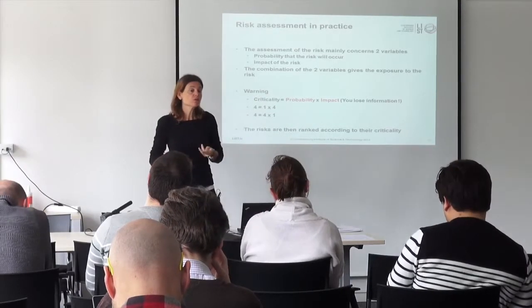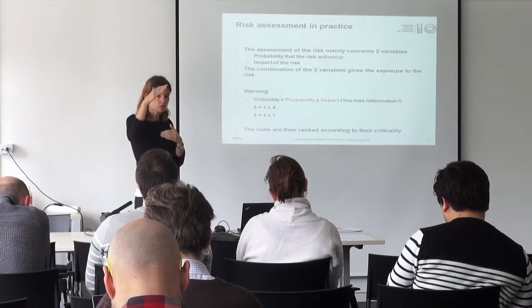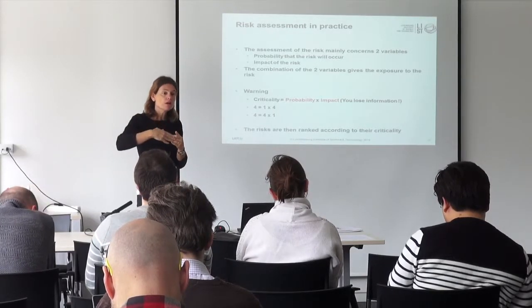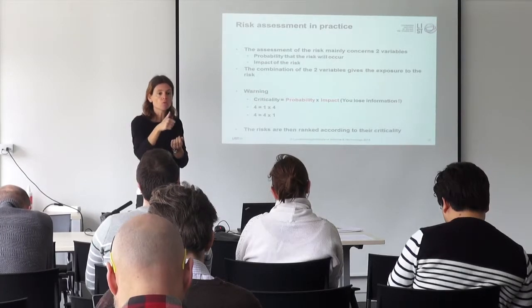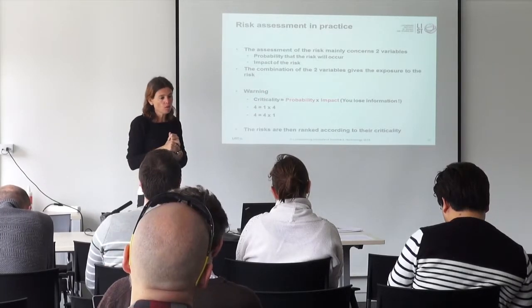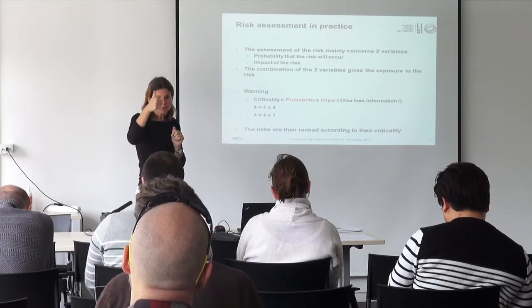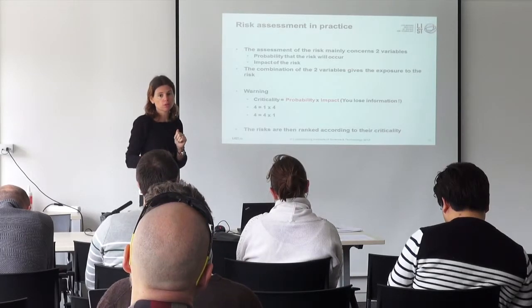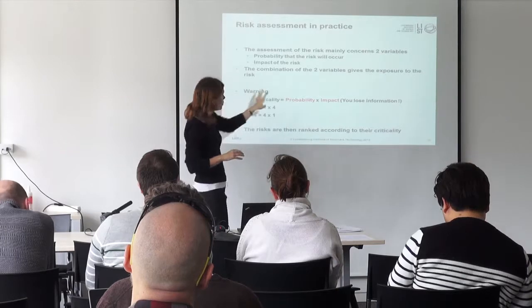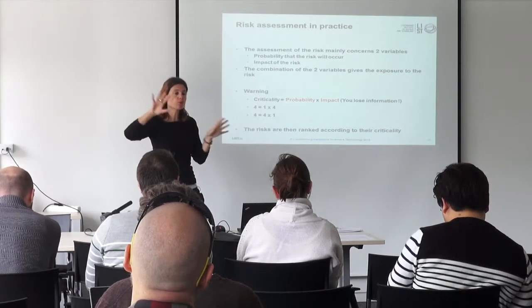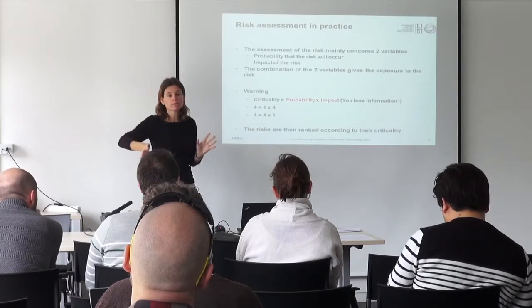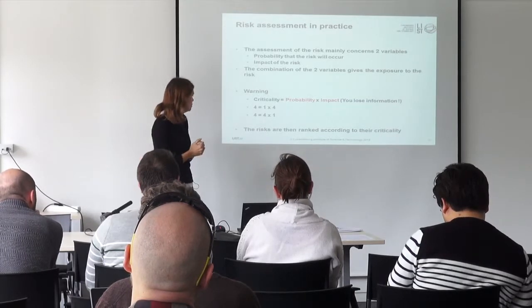Not sure. So sometimes, trying to rank your risks, you don't need to try to have one figure, one measure that will help you ranking the risks. You just need to define the probability and the impact, and then use a matrix to try to position the risks and to see the ones that are the most important.